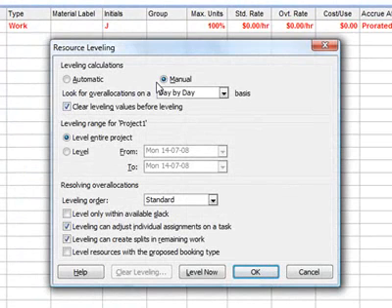It's a good idea to level your resources on a manual basis. If you choose Automatic, suddenly your project schedule will change and you will never know what the reason is. So to be on the safe side, always choose Manual. What leveling essentially does is, it can delay your activities, it can create splits in the task, or do something internally to somehow resolve the over allocation.